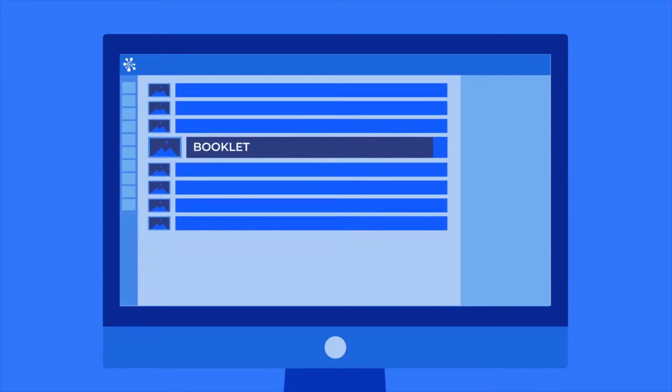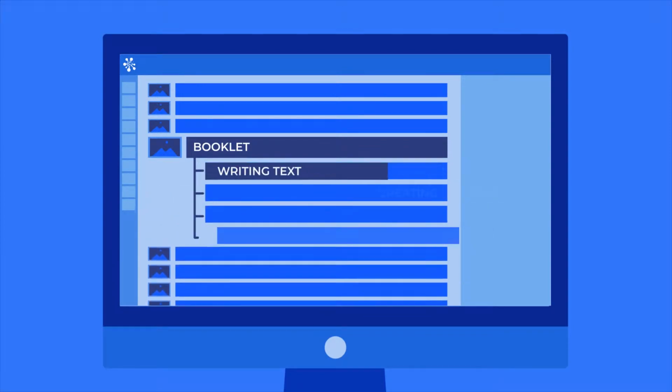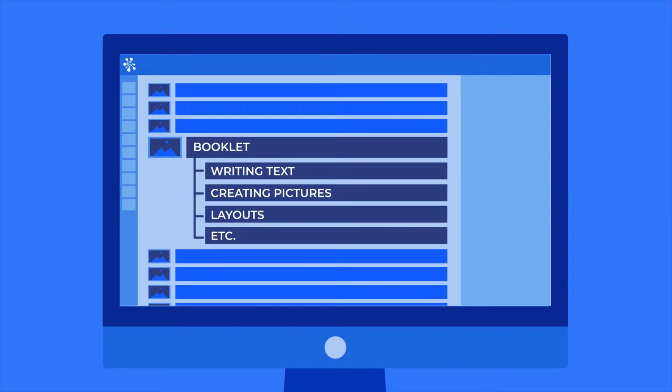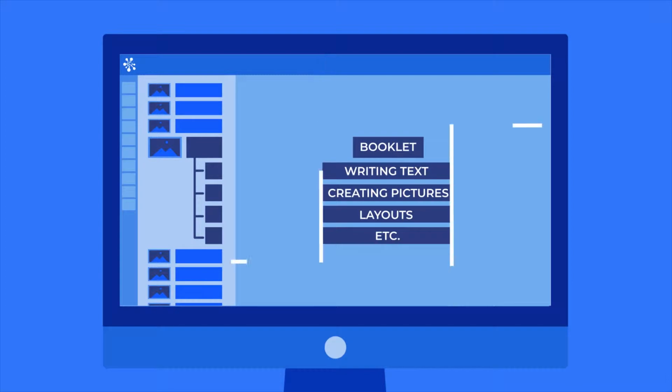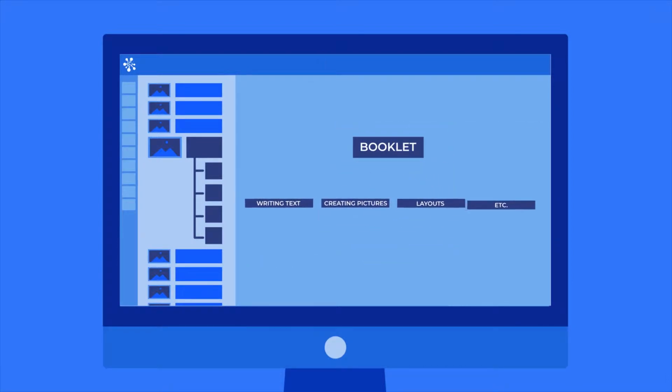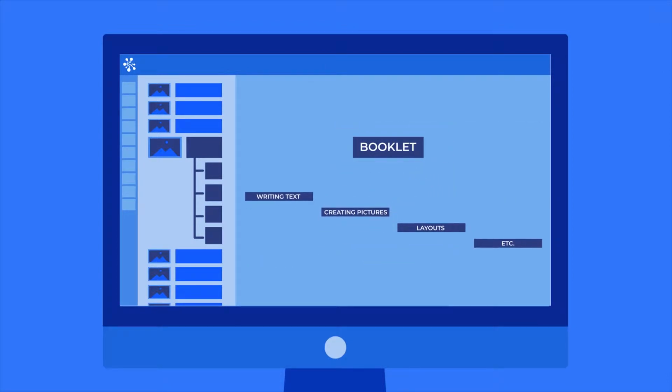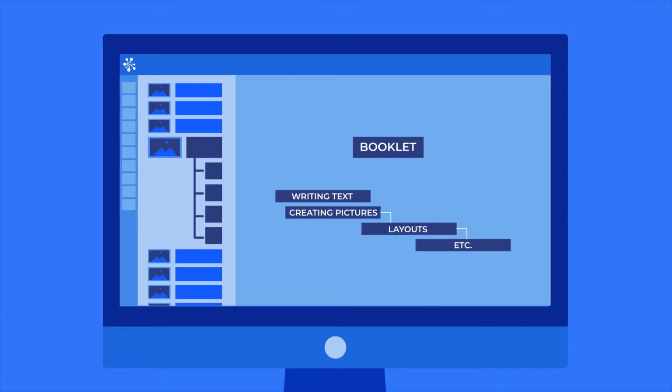Once we have created a subtask structure for various stages of the work, our next step is to set up links between them to allow the Cerebro system to automatically arrange them on the timeline. A link between tasks in Cerebro assumes that they are completed sequentially, one after the other. For example, in simple cases, you can link several tasks into a chain.